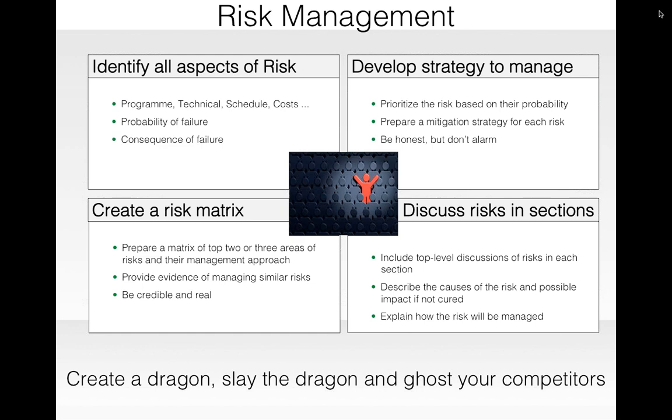So if you are writing about the technical section or the solution section, and in that you see a risk of the technology becoming outdated, you should always mention that risk: the customer has preferred to go with this technology, but there is a possibility that it may get outdated, and the customer and the OEM vendor may pull out the support, may stop supporting it.